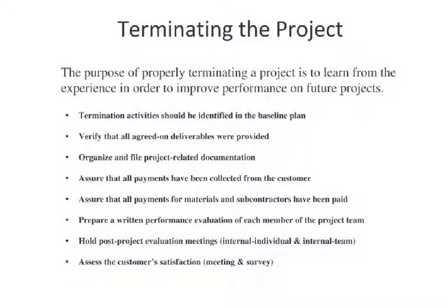Last but certainly not least, if you have a defined, distinct customer, or 1, 2, 3 defined, distinct customers, it's always a good idea to assess their satisfaction with the project. This is often done through either a face-to-face meeting with them or some type of a written survey, some type of an opinion or feedback survey to allow them to tell you what went well, what did not go well, and how you could improve, what they would have liked to have seen done differently.